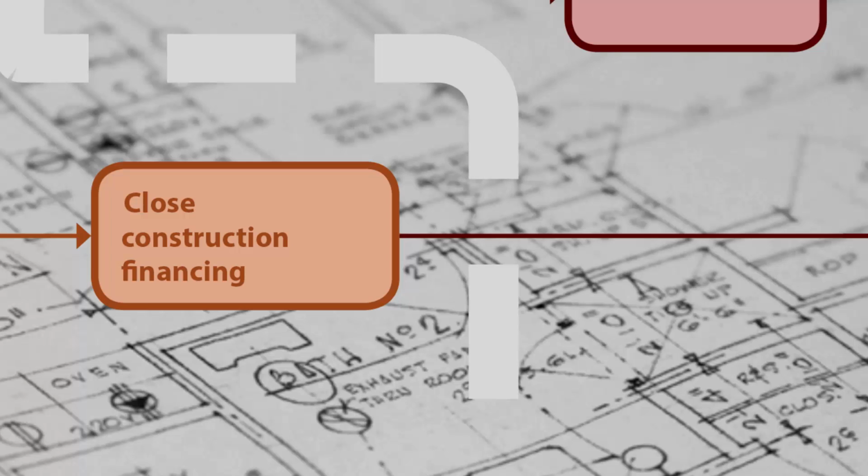From a finance standpoint, the construction phase is largely about drawing down funding sources when needed to ensure the contractor and other costs, like interim insurance, property taxes, and marketing costs, can be paid when they're due. Communication will be key, as many funders, especially public funders, have detailed reporting requirements that must be met in order to access funds. Even conventional lenders require substantial paperwork to be submitted in order to track actual progress against the draw schedule and various other requirements.